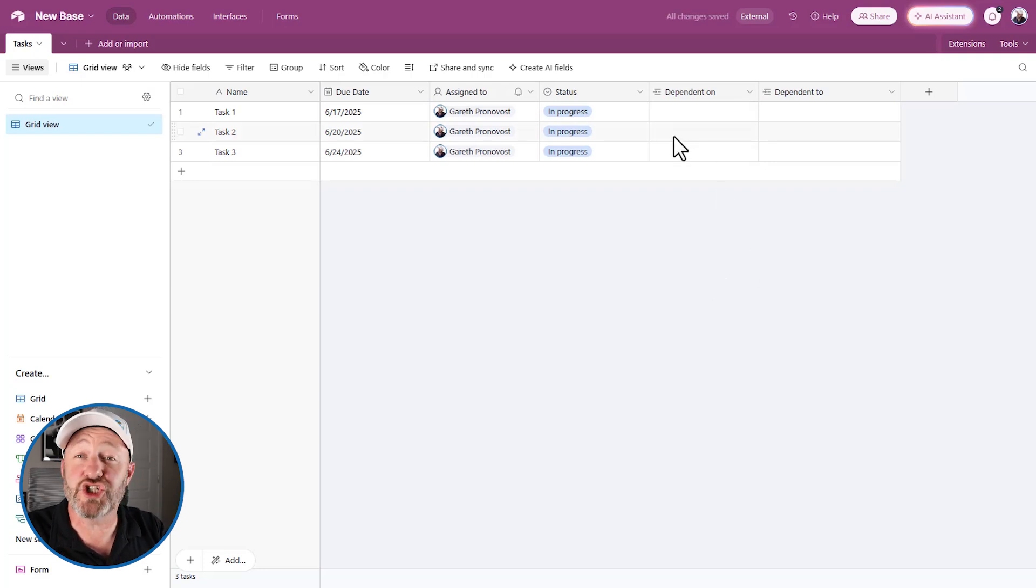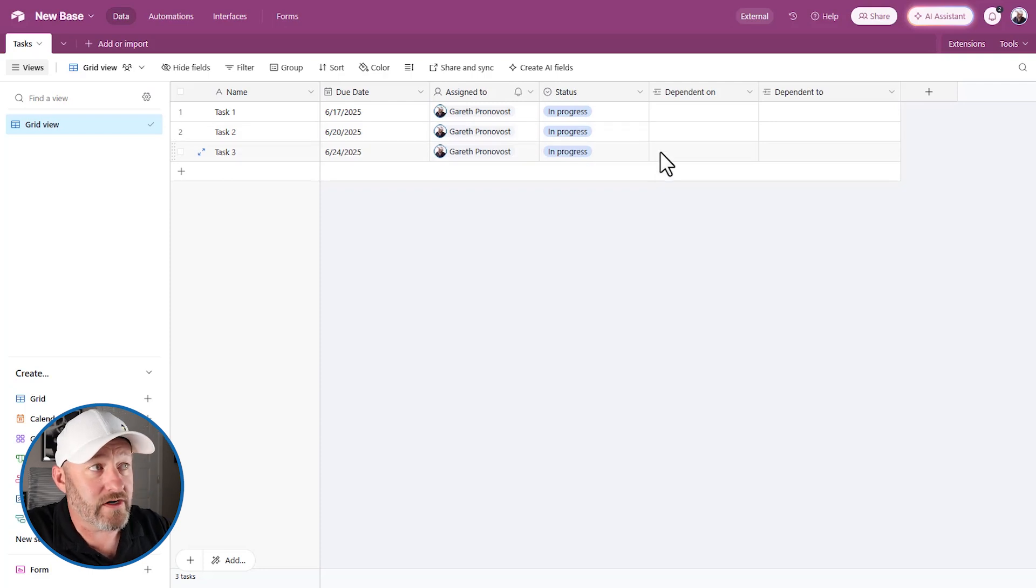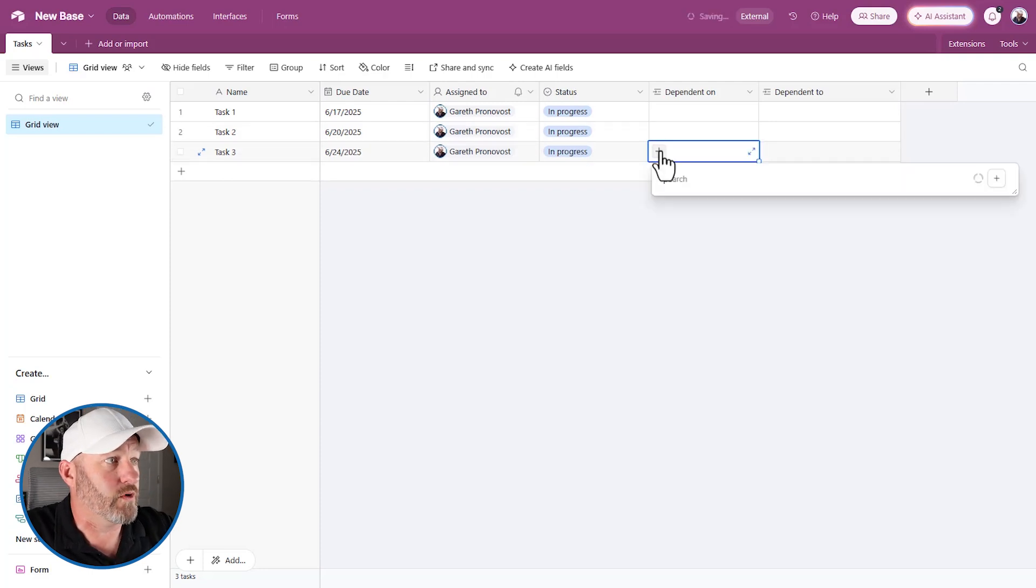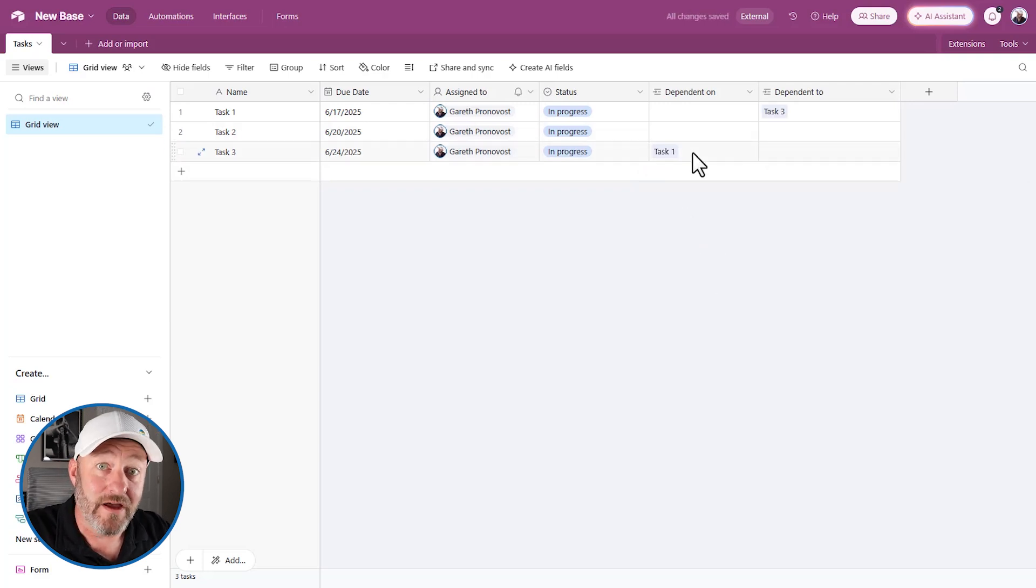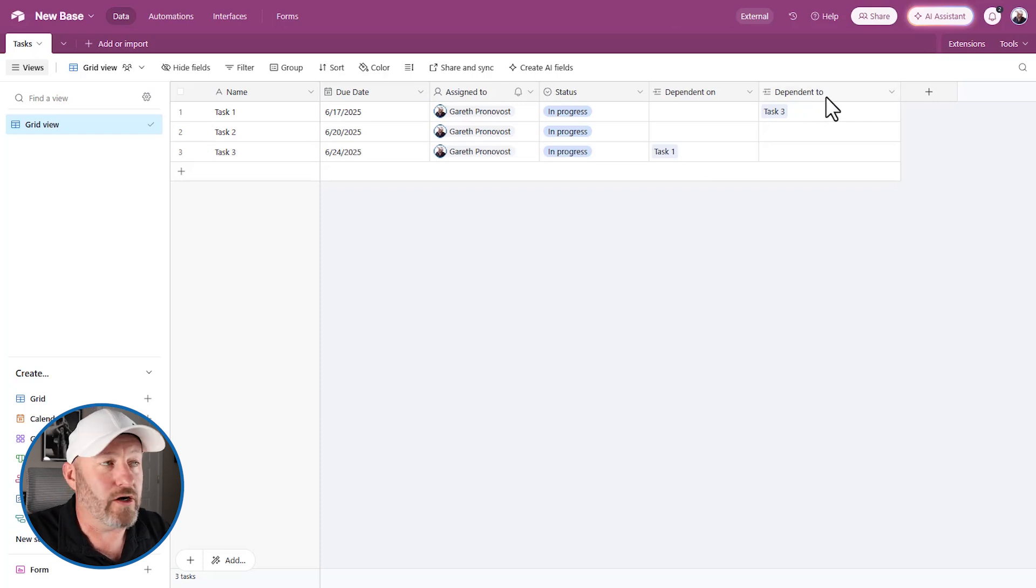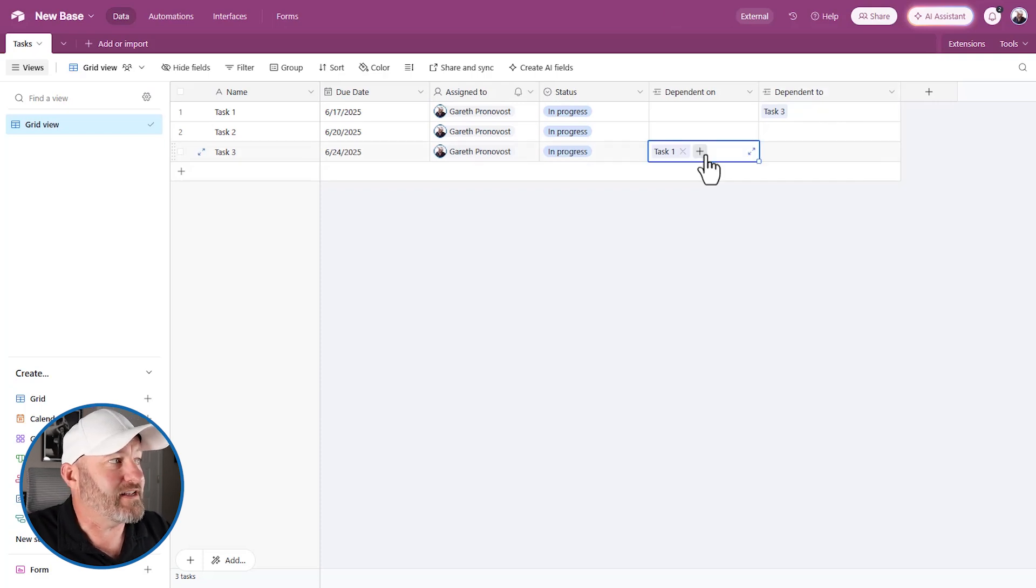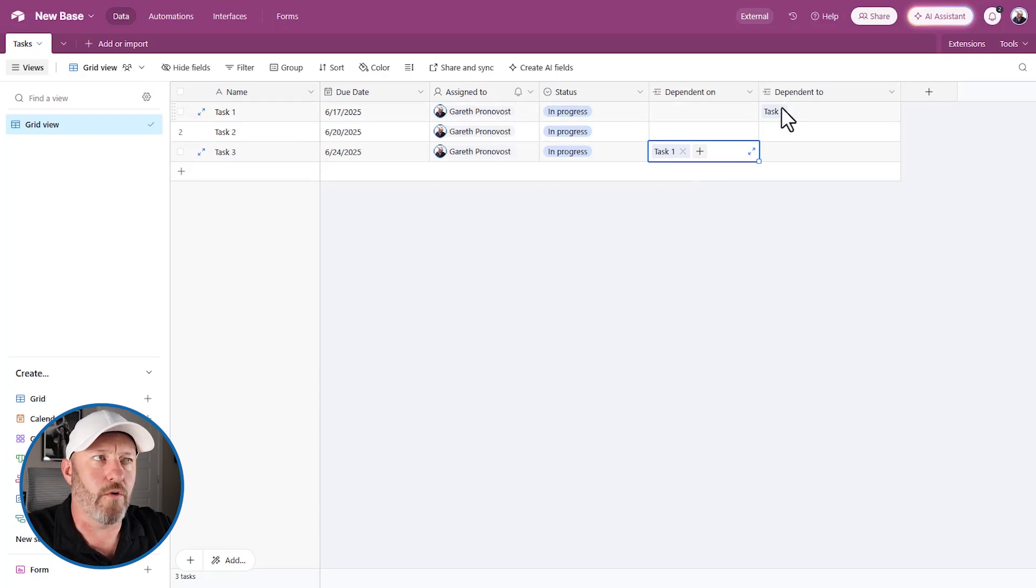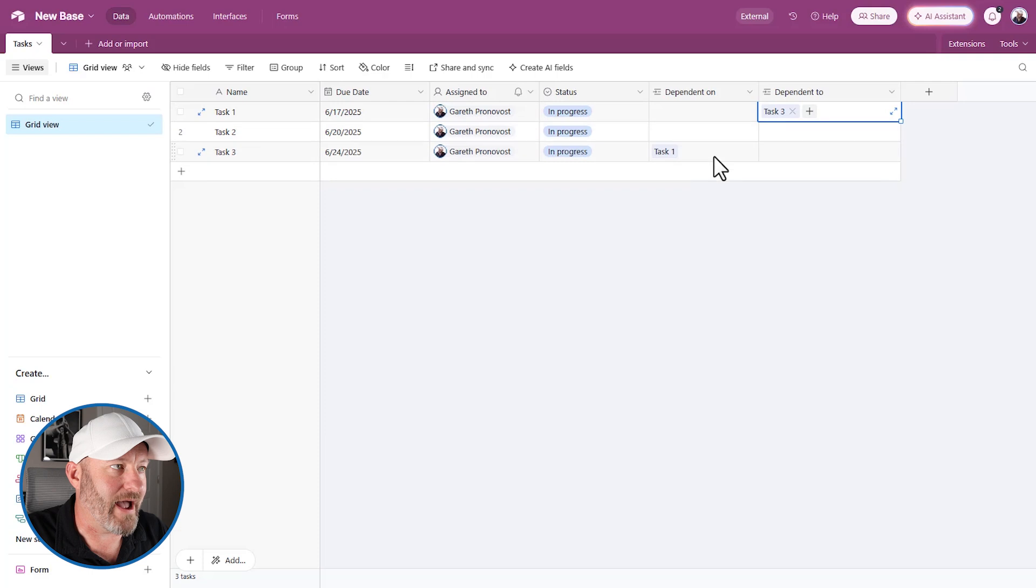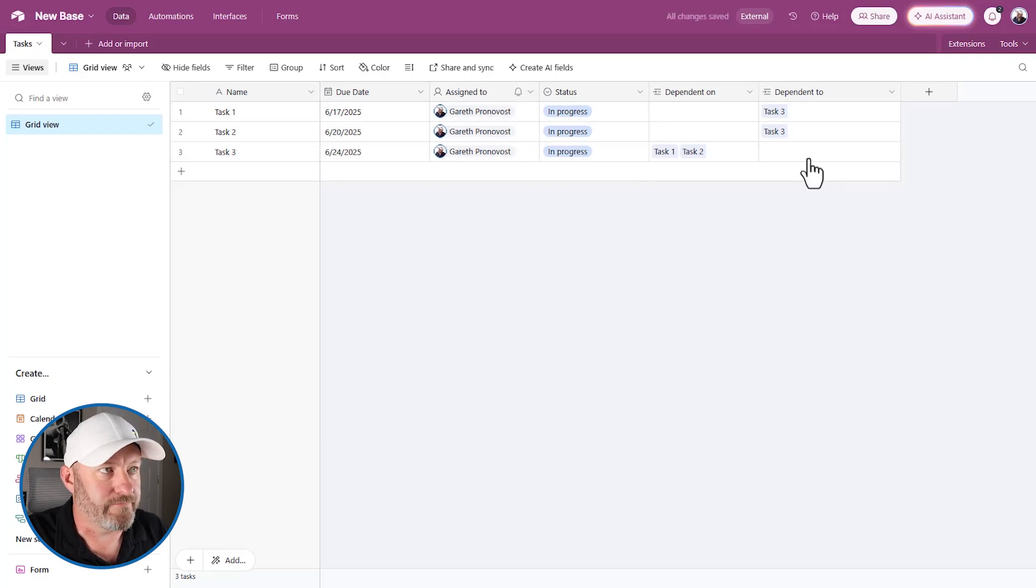So in our example, we said task three is dependent on one and two. So let's select them from the list. As I'm selecting them, you see the reciprocal of the relationship being linked here. So if I said task three is dependent on one, well then one is dependent two or dependent for task three. And so that's what you're seeing represented on that backlink. And we can go in here and do the same thing for this.